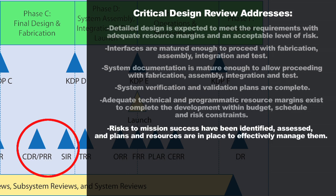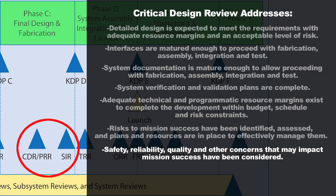The review team will also look at your risks to make sure all risks to mission success have been identified, assessed, and that you have plans and resources in place to effectively manage those risks. They'll also look at safety, reliability, quality, and other concerns that may impact mission success. This critical design review — right before you go off and start to integrate and build the system — is the key review to make sure you're ready to take all those components and build them into an actual spacecraft, making it a major milestone in the development of a new system.